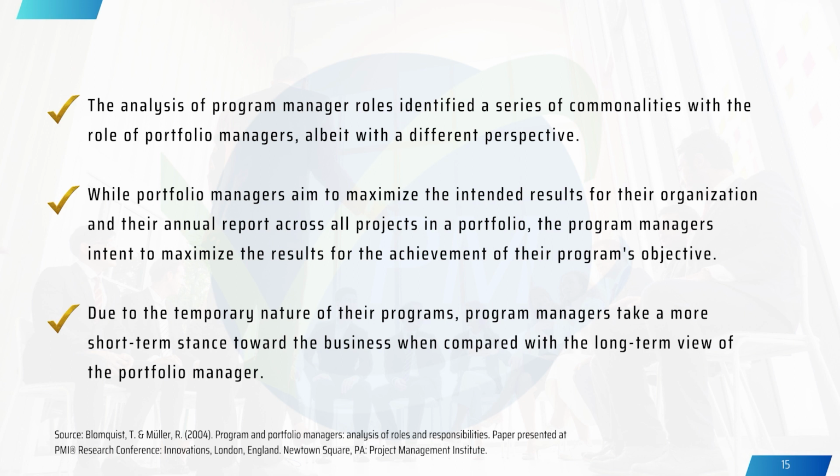While the portfolio manager aims to maximize the intended result for the organization across all the projects in a portfolio, the program manager is intended to maximize the result for achieving the program objective, and at the end of the day, the organization's objective. Due to the temporary nature of a program, the program manager takes a more short-term stance, whereas the portfolio manager looks beyond, actually multi-year. They have to think about many years to come.